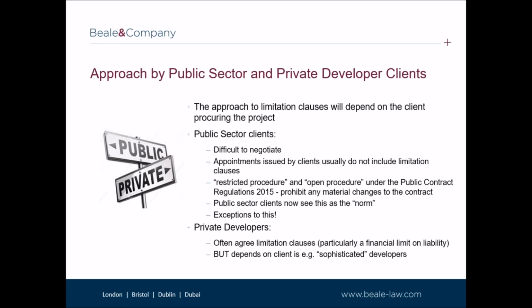For example, where the open or restricted procedure is used, the invitation to tender is likely to be accompanied by a statement that any qualified tender which does not agree to the proposed terms and conditions will automatically make the consultant's bid void. Accordingly, in most cases, any qualified tender which requests limitation and exclusion clauses will either see the amendment rejected or result in the consulting engineer's tender being unsuccessful.